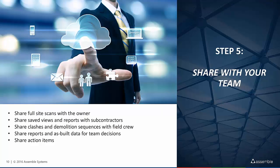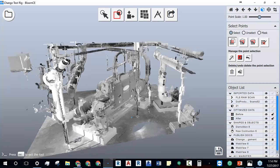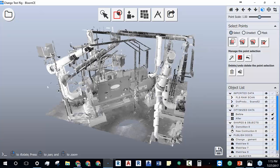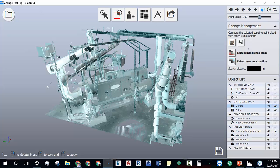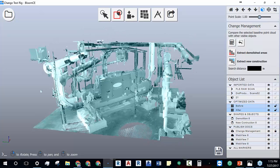Now I have two scans and I want to understand what was newly installed versus what was taken out or removed between these two scans. I select scan before, then come to the change management tool, which reads through all the scan data and figures out what is different between the two scans — identifying what was removed or what was added.